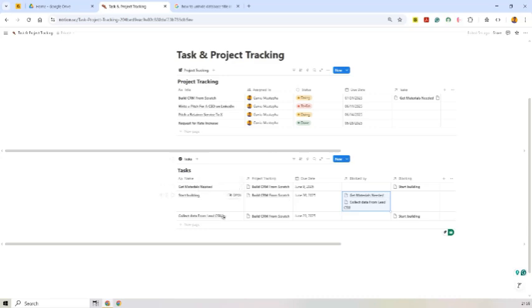Now, this is the first task. This is the second task. For the table to be complete, we have to add that this one is blocked by this one. If you do not do this one, you cannot move on to this one. There are some people that like to skip steps, they like to skip process. So once you add that this one is blocked by this one, they know that they have to do this one before they can do this one. So now let's do that.